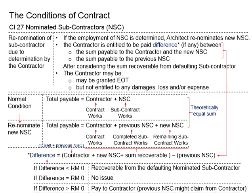Although it is not stated here, what if the difference is less than zero? That means the total sum recoverable from the defaulting subcontractor is insufficient to cover the damage, loss, and expenses due to the defaulting nominated subcontractor. Theoretically, the relevant amount should be able to be recovered from the defaulting nominated subcontractor; otherwise, the contractor will have to bear the relevant cost.